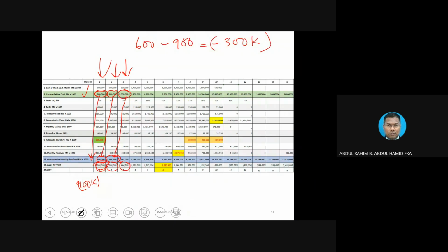No, because once you come into the row number 12, meaning to say it is a net already, you take into account everything. So now after doing that, you notice that you are going to get the answer, the maximum cash is here, and it is happening on the 6th month. Okay, that will be the second and third question. And then the value of the project here.